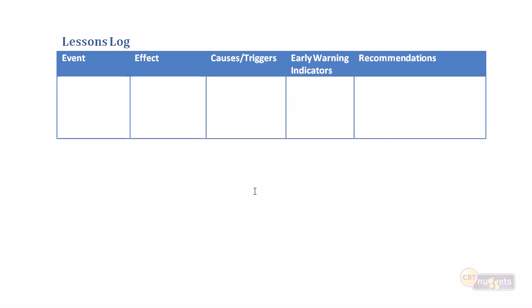The key to the lessons learned log is to put the time and attention into it at the end of each stage so we can improve from stage to stage, and at the end of the project so we can improve our overall corporate best practices for project delivery.